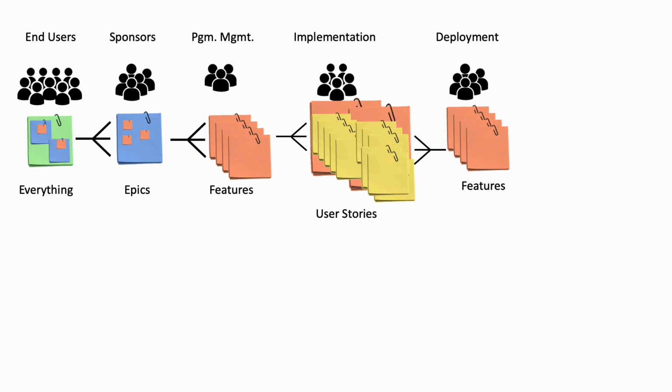In a similar way, collaboration across different teams is favored because we can define priorities at feature level, and if team A needs help on a user story from team B, they just need to see the user stories they are working on, what are the features they belong to, and which one has the highest priority. And then the decision should be obvious.